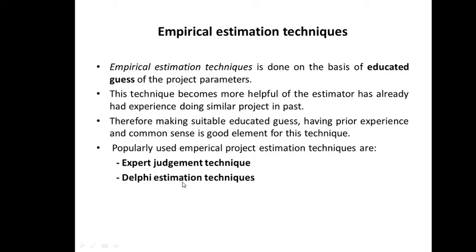But again, we have one more method, that is the Delphi cost estimation technique. What does this technique say? Since there was a problem with a single expert or a group of experts, we take a number of experts, or the team members who will help us in estimation, along with a coordinator. That means someone who is going to head this team. Whatever the teammates estimate is taken up by the coordinator. He summarizes whatever estimations the people perform. Again, several cycles repeat, like brainstorming. Again, they give their views.